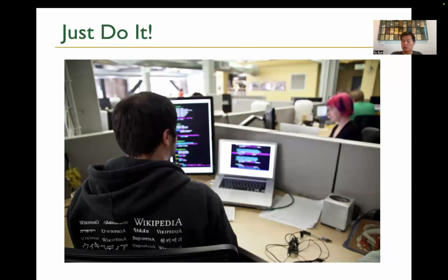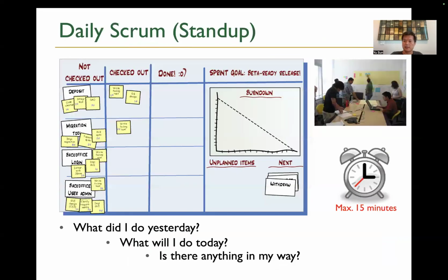As you go through this whole process, I did mention this Scrum meeting, or we call it the stand-up meeting, very important. A lot of the time people run this meeting once a day. It's a daily Scrum meeting. That's the most typical way to run it. All the developers, the team, get together. It's normally 10, 15 minutes. People like to do it standing up so that we can keep the meeting shorter.